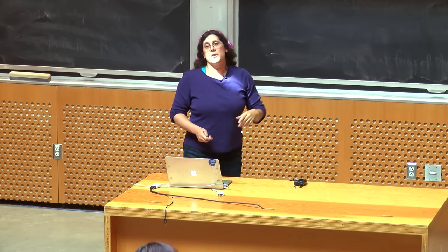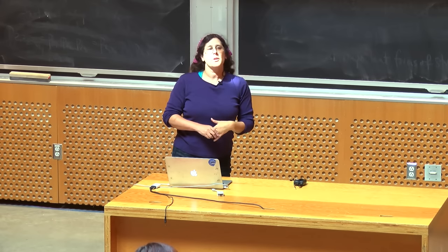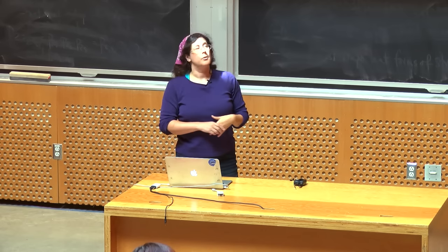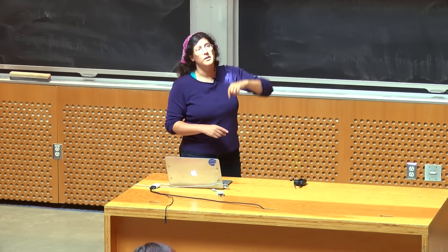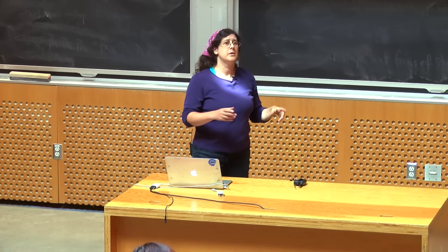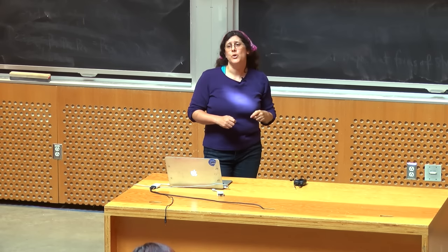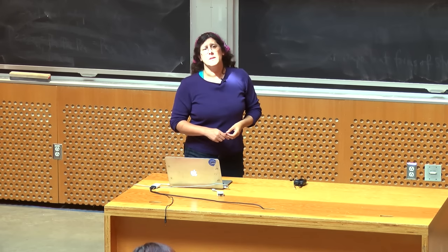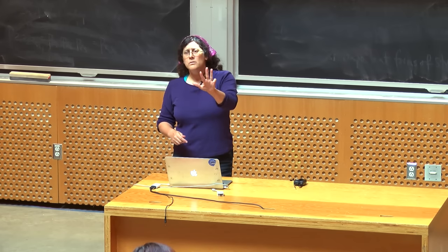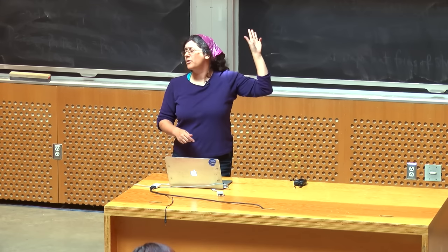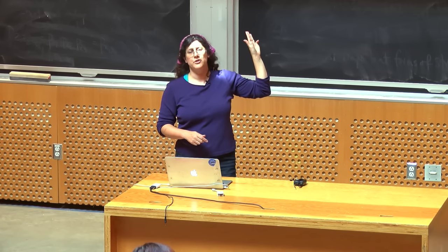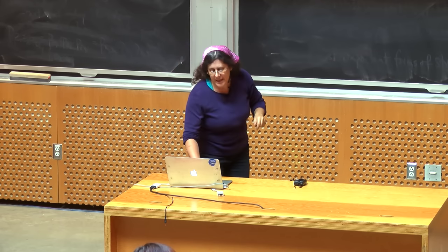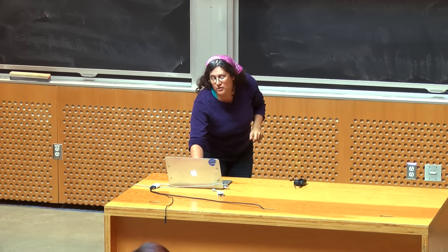Then you need an estimation of how big a job this is. For the product backlog, we don't actually recommend trying to do really fine estimation. They're using numbers in this backlog. I should make a new one that uses my preferred system, which is actually just using the words small, medium, large, extra large. And how big is small? I'm not really sure. When you first create your backlog, you won't be really sure either. But you can probably tell the difference between a small feature and a medium feature and an extra large feature.